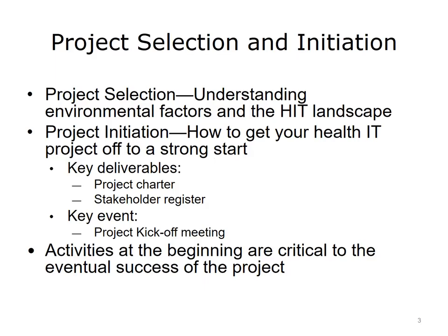Project Initiation stresses the importance of getting your Health IT project off to a strong start and setting it up for success. This unit also deals with critical deliverables and events that occur during early stages of projects. The key deliverables are the project charter and the stakeholder register. A key event is the project kickoff meeting. It is important to stress how critical these activities at the start of a project are to the project's eventual success.